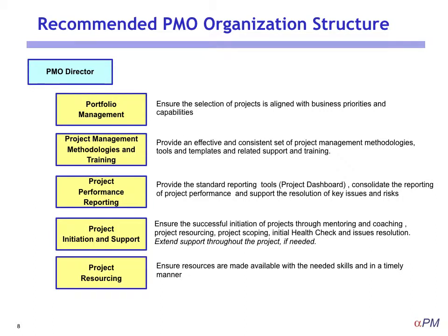And then there's project resourcing, the fifth of the components of the PMO. And in this, as you can all guess, resourcing of projects is a very challenging issue, particularly in most organizations that apply the matrix type of organization structure, where you share some of the key resources amongst many projects. So there's got to be some vehicle, some mechanism for making sure that the resources that a project needs are made available with the needed skills and in a timely manner. So again, the PMO, I think, can act as a good cohesive and coordinating force for helping this to happen.